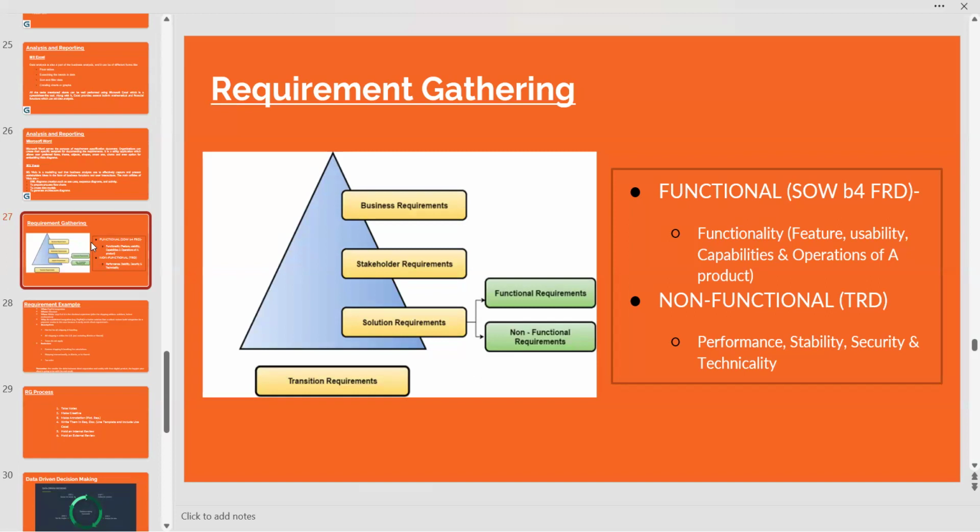So starting with that, first feasibility: can we do this? If we can do this, how much extra time and how many extra resources, meaning actual employees who will work on that, are needed? Do we require any specific software and hardware specification, or any particular skill that we do not have in our team, so we might have to hire or take that kind of employee on contract? So everything is thought through in detail.